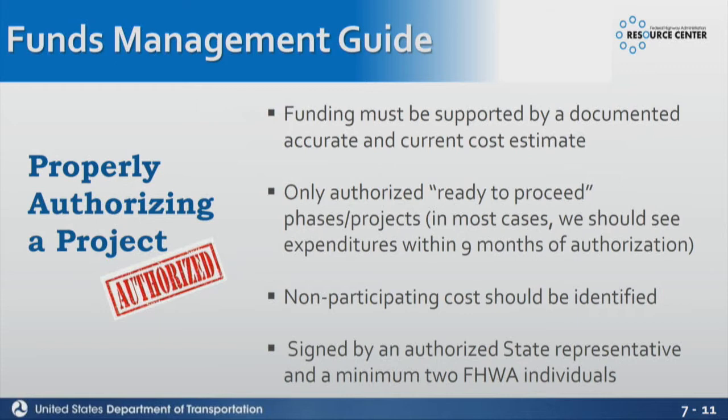If we're seeing a lot of ups and downs throughout the life of the design, that's a first little yellow flag to start looking and asking, why are we seeing these ups and downs? Maybe we should come up with a better way to do this estimate, or maybe this is a unique project and we need to adjust it.